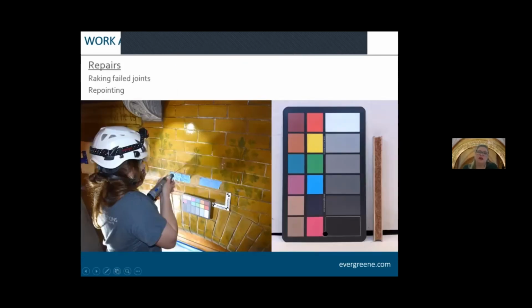Lastly, one of the other repair programs that we are doing, because of the amount of salts and to allow the building to finally dry out as much as possible, we removed a lot of the joints in the north and south galleries, mechanically removing the mortar joints between the brickwork. And also we will be then repointing those based on the analysis that HBA's team did to match a historically accurate as well as color matched mortar to replicate the original.